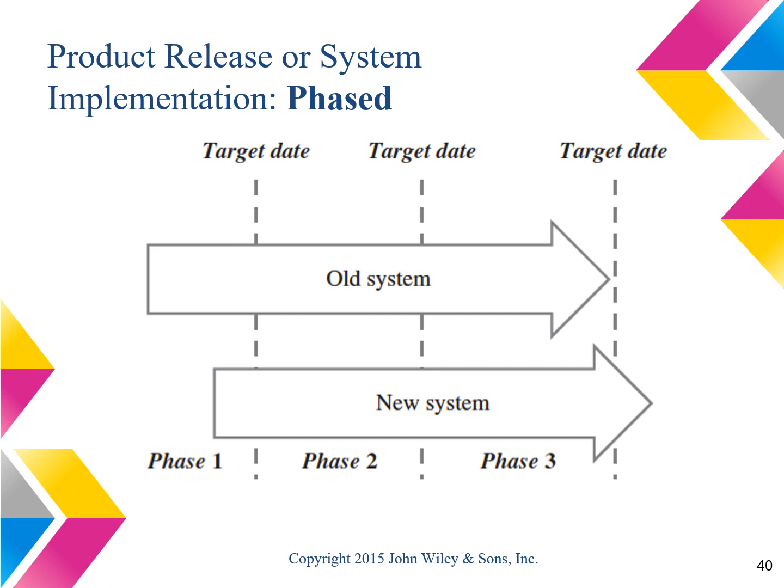In the phased implementation approach, the new system gets implemented in phases, and these phases would be different parts of the organization. We use this approach extensively in US courts, because when we had a system to be deployed in, say, 94 district courts, we would identify some courts that wanted to go first and other courts that would go after them, and so forth.